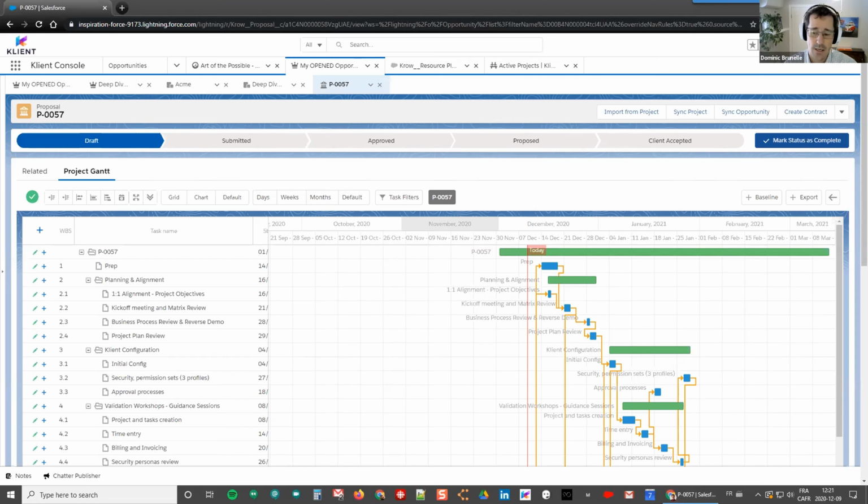There's one thing that exists, and not necessarily going there, but when you define a template, you can have relative days, so that you could have different tasks without them being linked. At least from a starting point, when you load a new project from a starting date, you could have tasks that have, let's say, a 20-day relative date. So based on a start date, that task would only start 20 days after. So there's a few concepts. Then after, yes, when you get into moving dynamically a project that exists, then those links are kind of lost. But at least there's a few options if you're not fully linked between tasks, so that when you first load it, you could still use relative days. I could look into that when we get to the planning and scheduling thing.